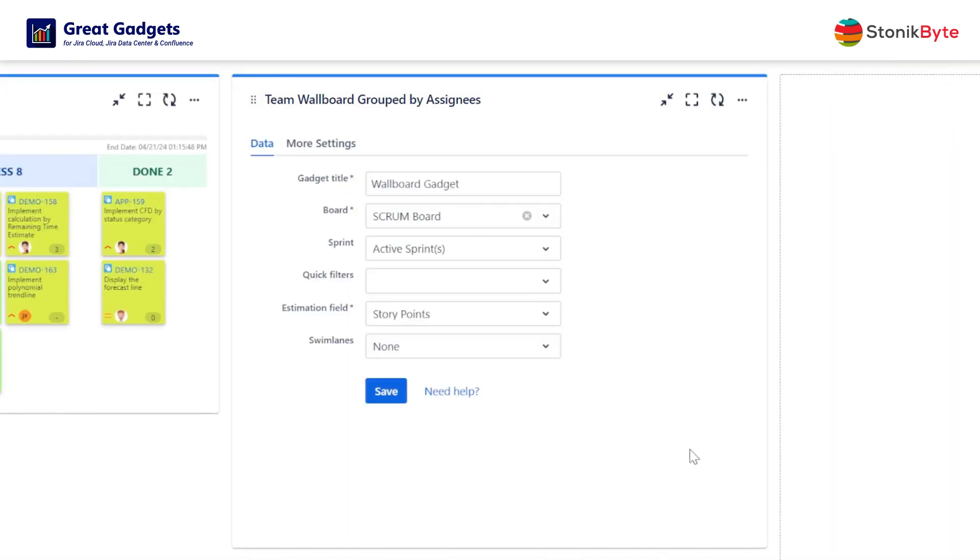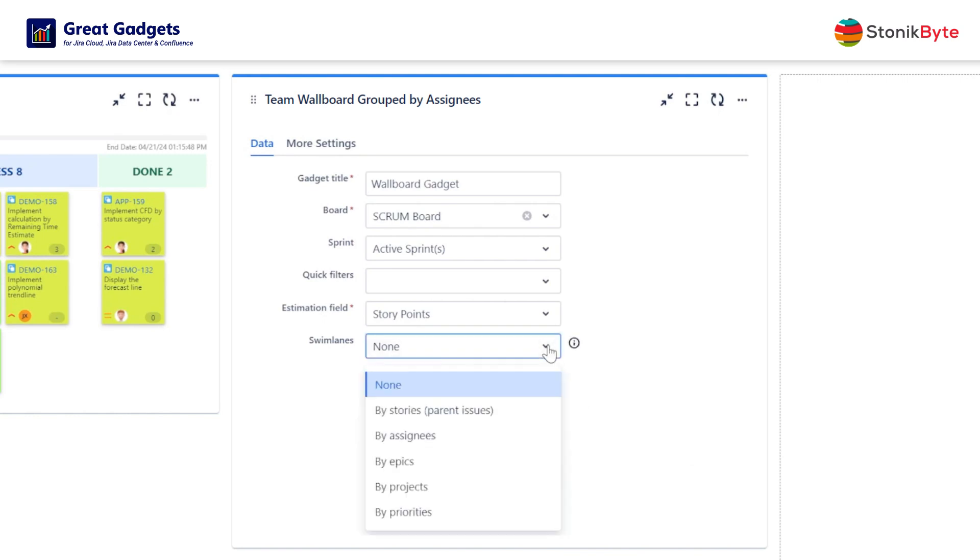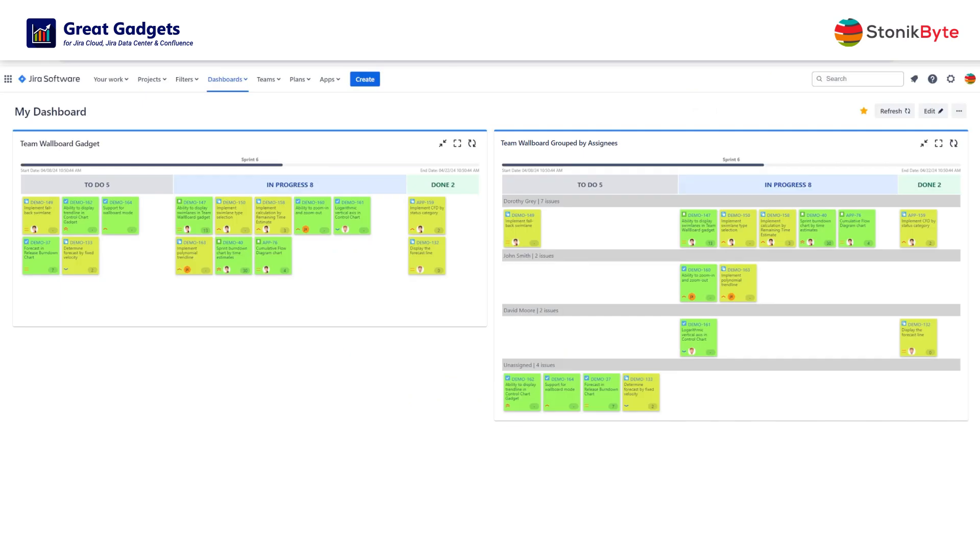If you want the gadget to display swim lanes, just choose the appropriate swim lane criteria, like assignees for example, and here you go. The gadget now displays the work items in swim lanes.